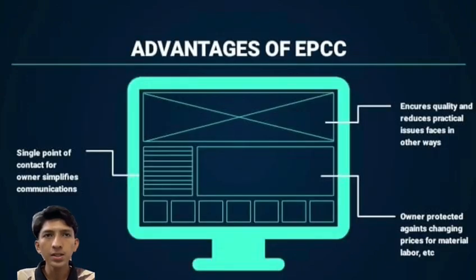Advantages of EPCC. First is a single point of contact for the owner, which simplifies communication. For example, instruction issued by one party can produce something of quality. Second is ensuring quality and reducing practical issues faced in other ways. Third is that the owner is protected against changing prices for material, labor, and others. For example, preventing fraud or a developer taking advantage of the owner.